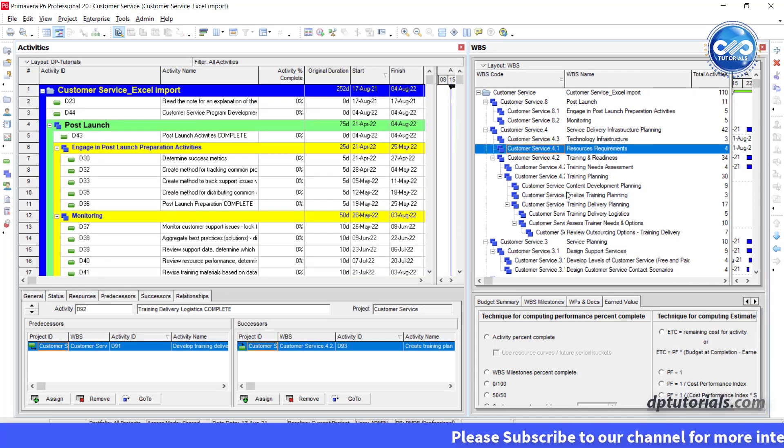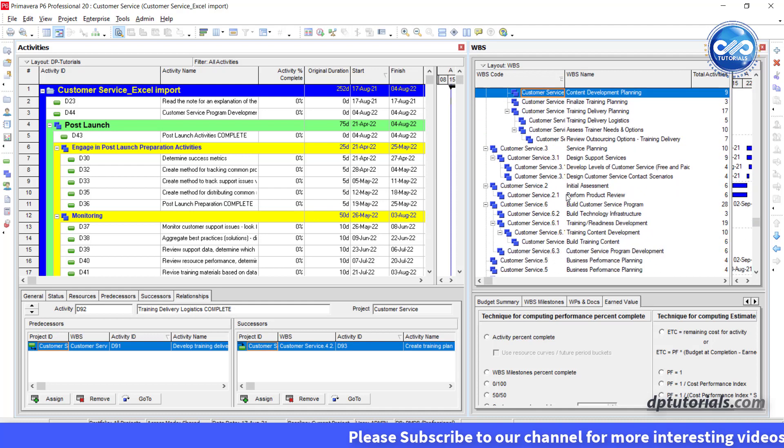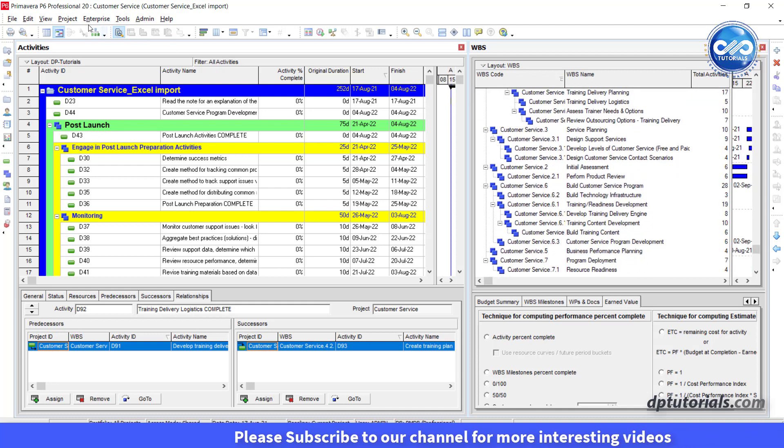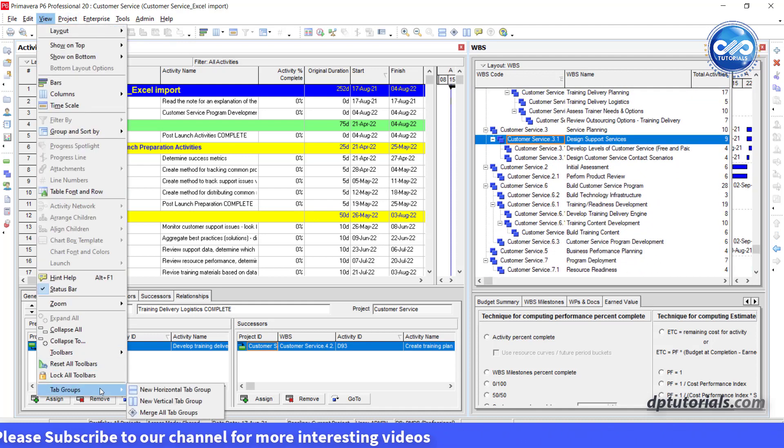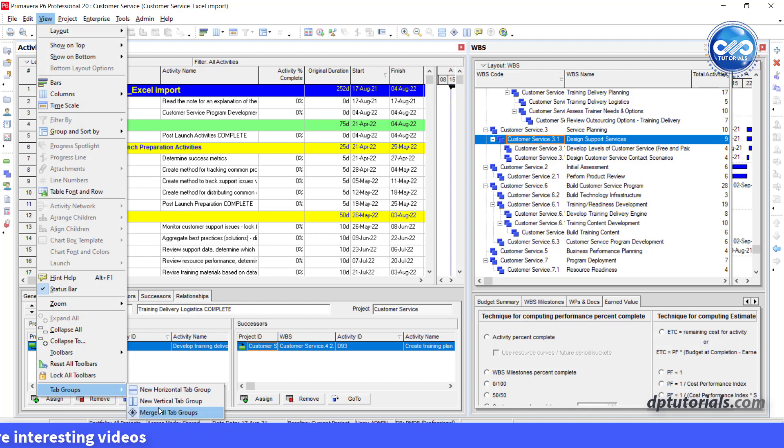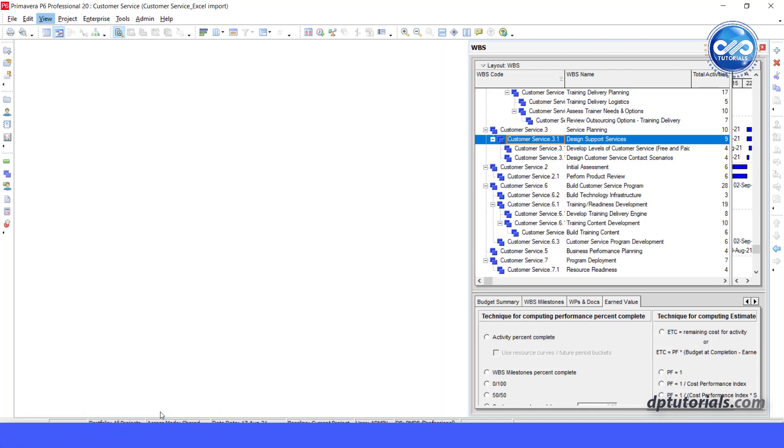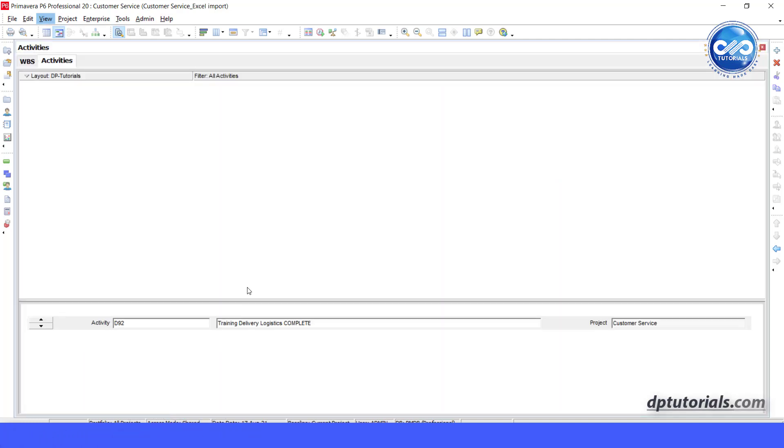To remove the split screen, simply go to View again, go to Tab Groups and finally click on Merge All Tab Groups option to view the WBS window.